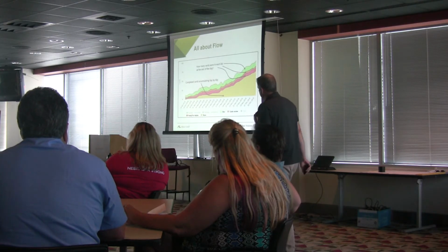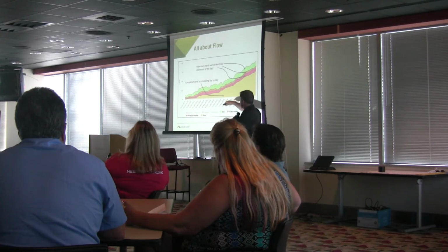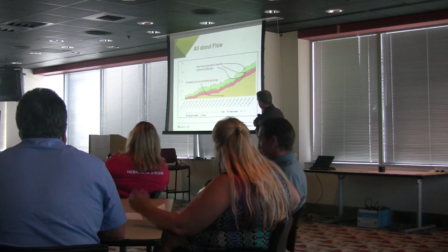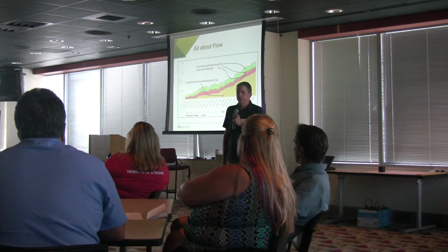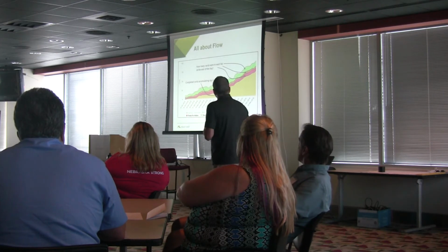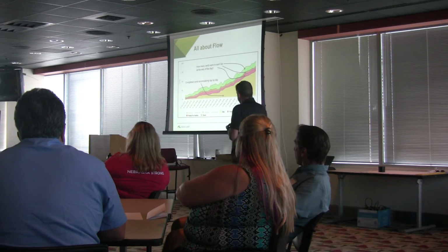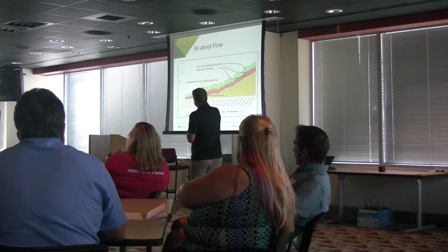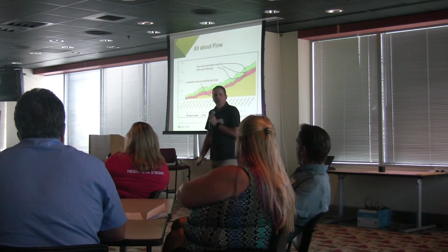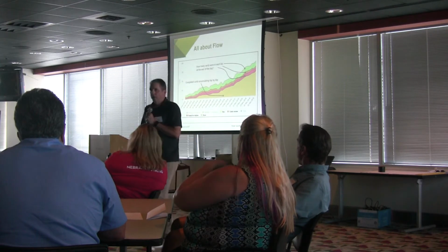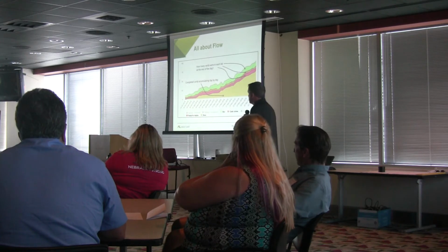Let me show you another. It might look this way with the 4 bands. The green depicts what's in development, the orange is in code review, the pink is ready for deploy, and then the yellow is done. And the way to look at this, it's over time, so you see dates here, and this is simply an accumulation of how many cards or how many tickets or how many stories, whatever you want to call them, was completed over that period of time. Does that make sense? Okay.